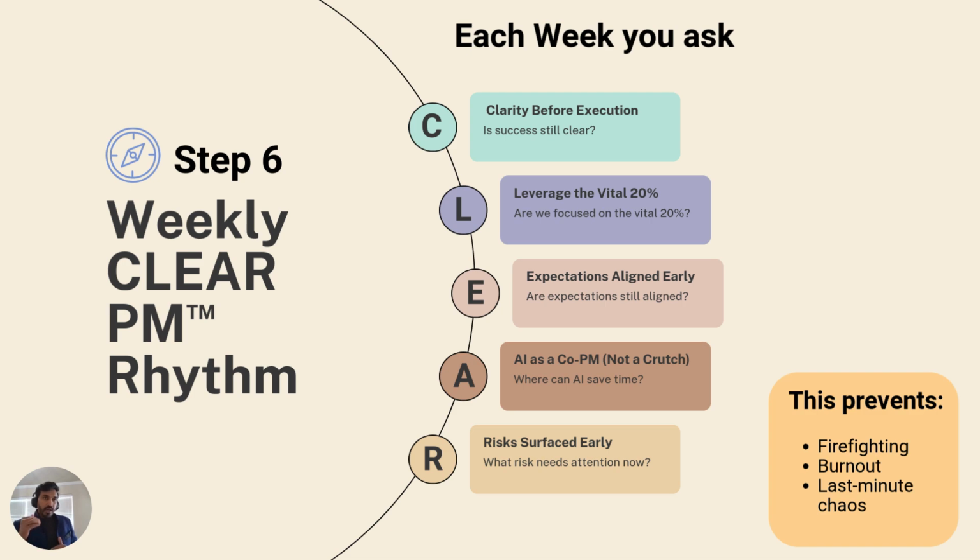But how many times is the doctor using it, how many times is the nurse using it, how many times is the scheduler using that dashboard? This is one of the parameters. If the doctor is using it just maybe once a month, I think I should skip the widget the doctor is looking for.